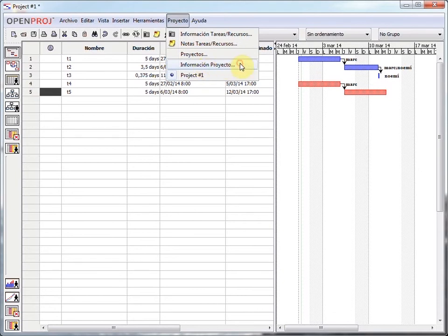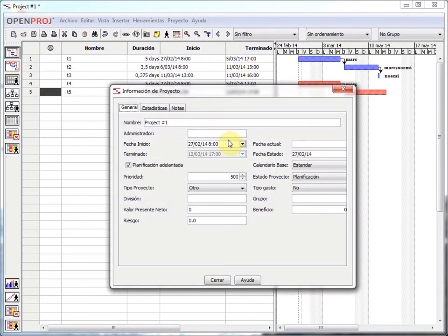And if we go there, you get this window where you have quick access to information which is very relevant, such as the starting date and the finish date. That of course can be changed. One or the 2 can be changed, and I can start my project earlier on or in the future. I can plan it for next year, whatever, and in any case this finish date is going to be refreshed and is going to be recalculated.